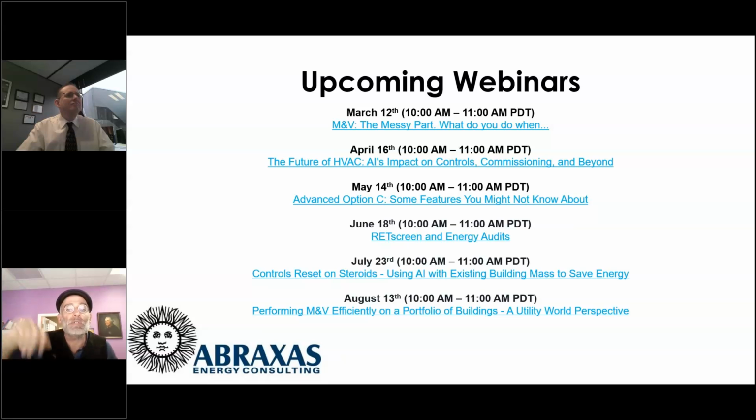You show them all the issues, like let's say from SkySpark or something. O&M staff isn't going to do any of them. It's just too many. It's too daunting. But if you have one thing to do, we're only doing scheduling today. Here, I made a list. Here's 29 air handlers you can turn off. Okay, let's do that. Next week I'll be back and we're going to work on something else. And you do one thing at a time. Now, if you can do something like that as an ESCO, you can keep it working. But the whole ESCO needs to understand, not just the M&V staff, because no one listens to them anyway.